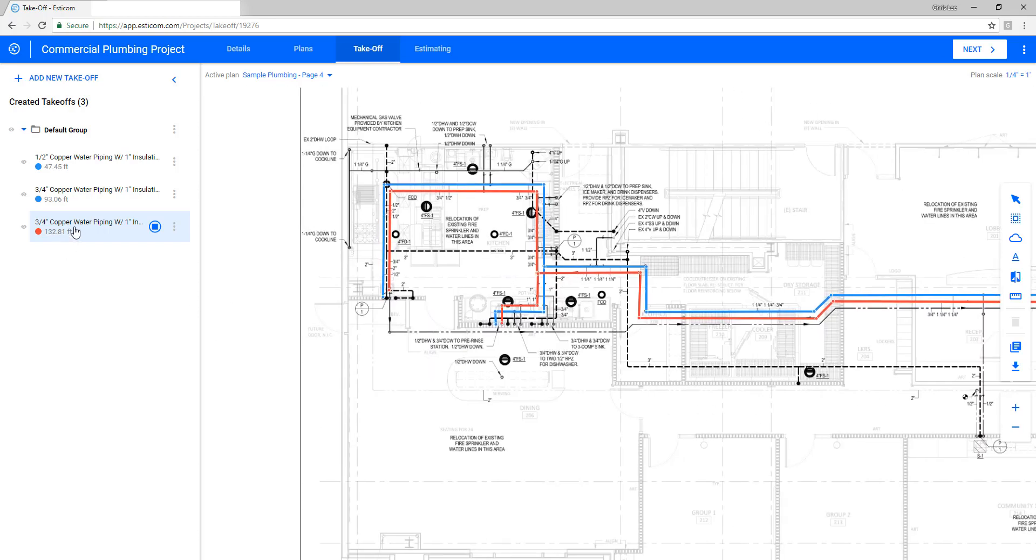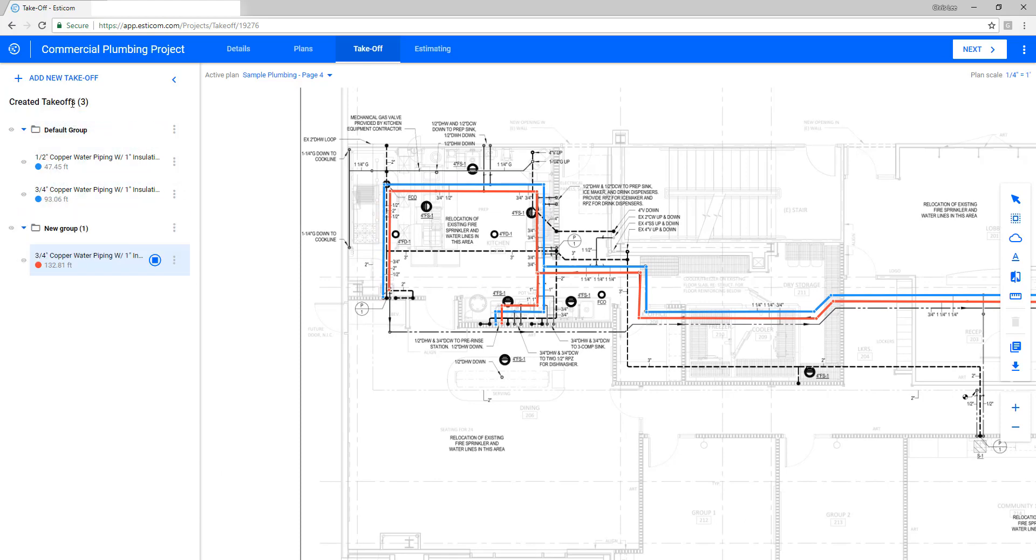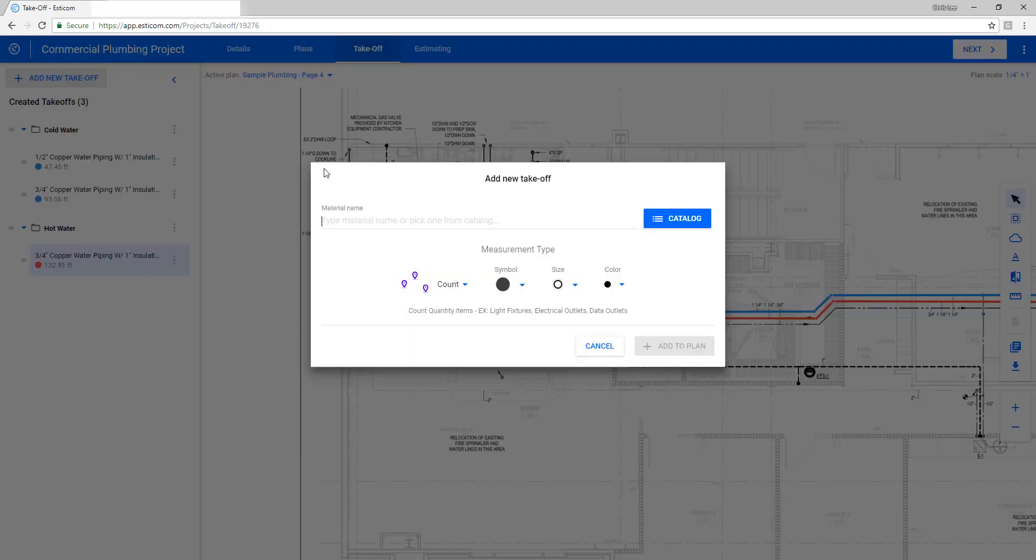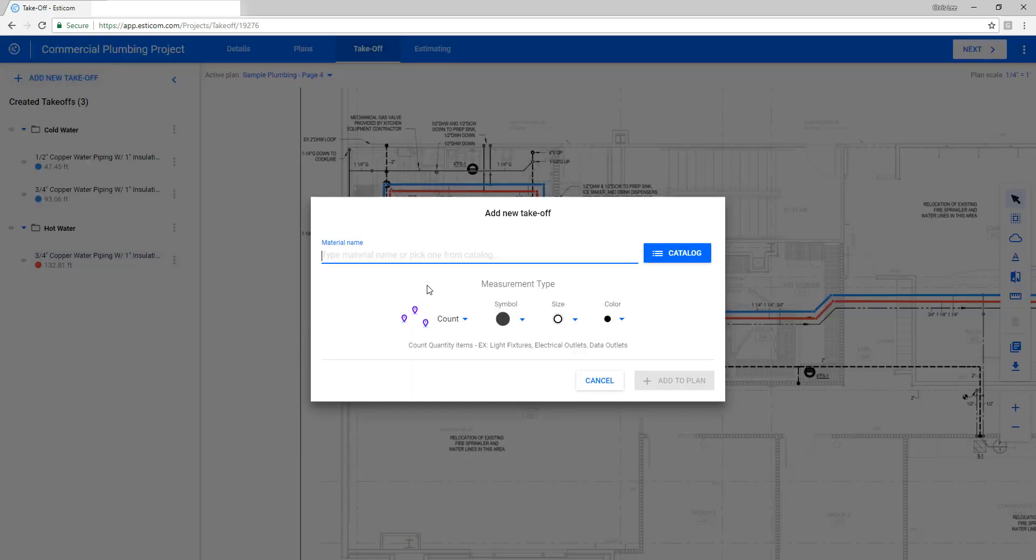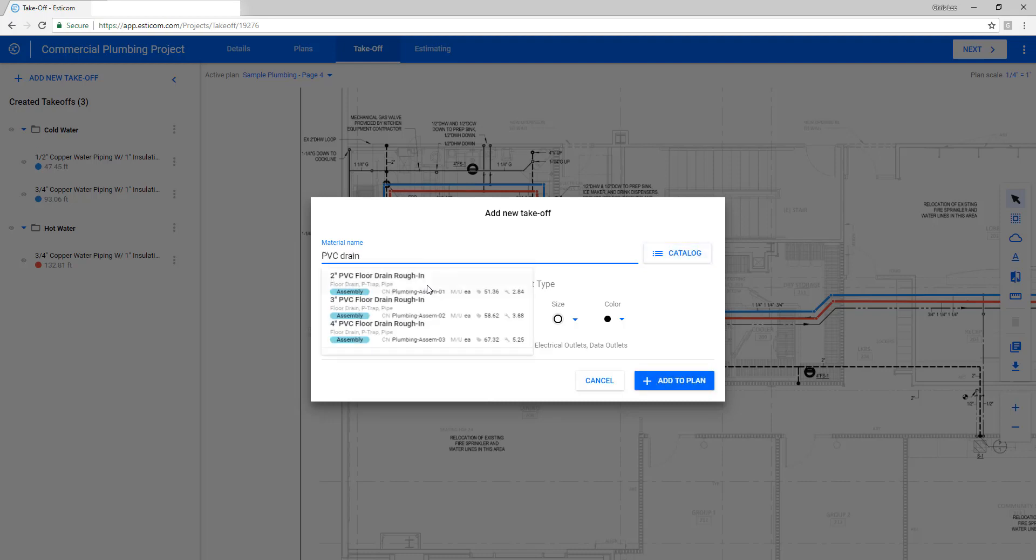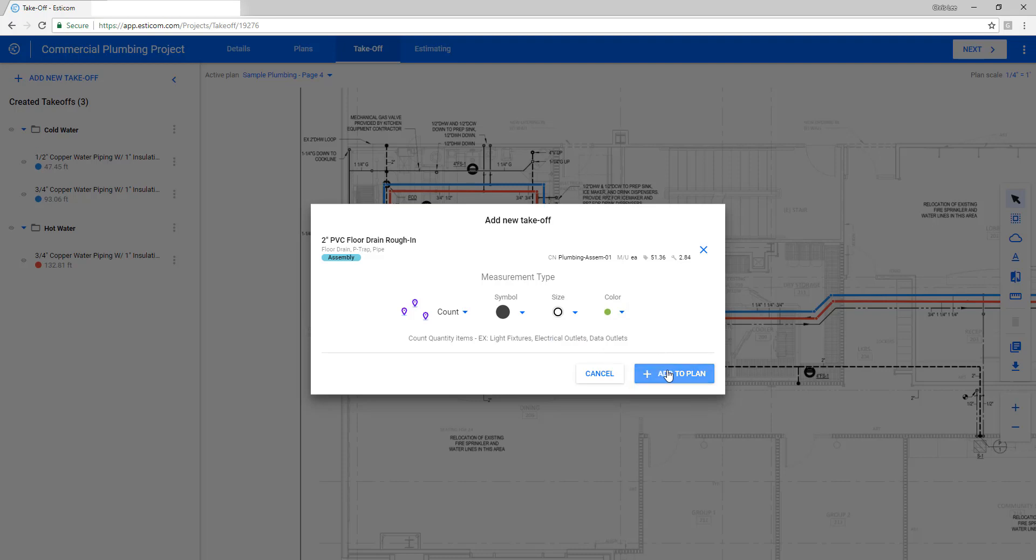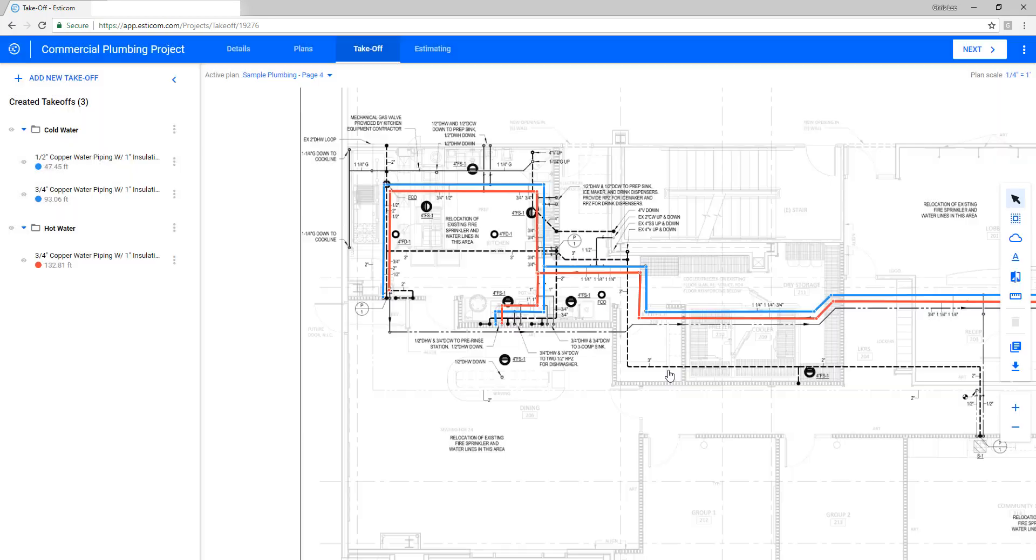Let's organize our takeoffs in the phases. This can be done by dragging the takeoff to the create group button and then renaming the groups. In this case, we'll break up the cold and hot water runs and then add a new takeoff for floor drains as depicted on the drawing and get a count on those items. Following the same process as before, we'll search the material database for a 2-inch PVC floor drain assembly. Let's adjust the takeoff properties appropriately and click add to plan and begin counting our floor drains.